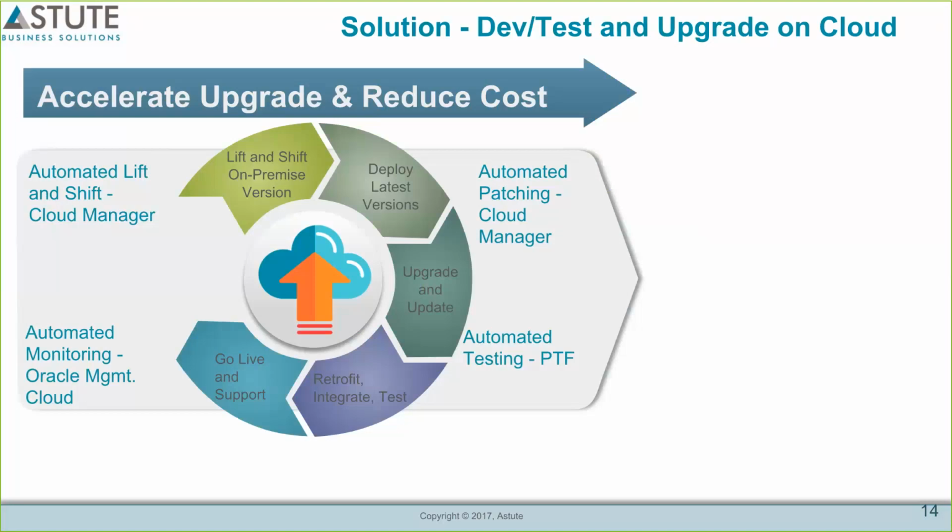In PeopleSoft, it's PeopleSoft Test Framework. So imagine you had a library of PeopleSoft tests tailored to your instance, and every time you applied a PUM update, the first thing you would do is run that entire battery of tests, get some impact analysis, what works, what doesn't. So immediately you know where you need to focus your team's time and effort and how you can be successful in the rest of the project.